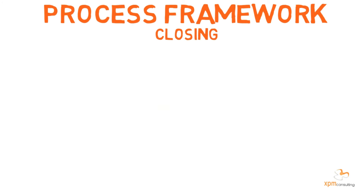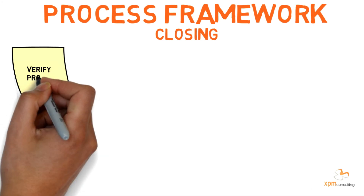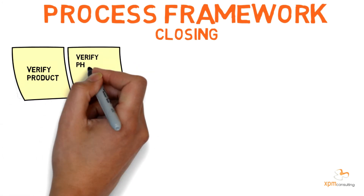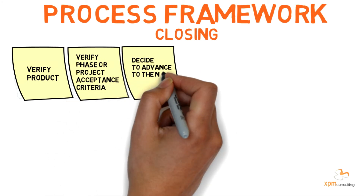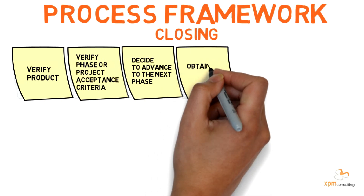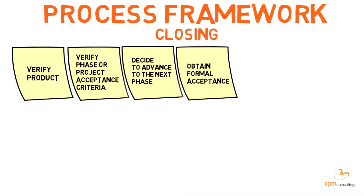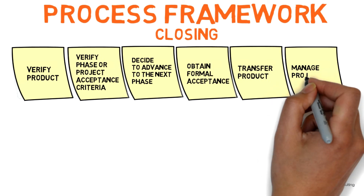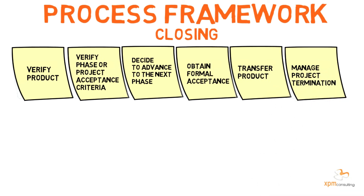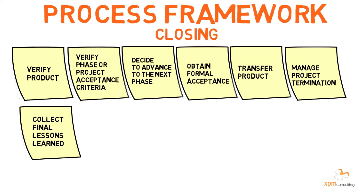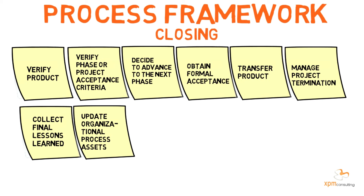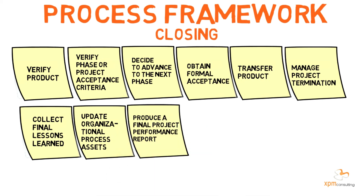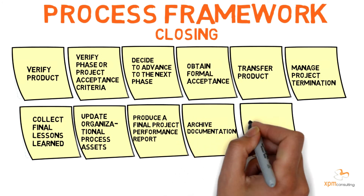While closing, the project management team may: verify if the product was delivered as required; verify if the phase or project acceptance criteria were met; decide whether to advance to the next project phase; obtain formal acceptance to close the project or phase; transfer the product to operations; manage project termination before completion; collect final lessons learned; update organizational process assets with the acquired lessons learned; produce a final project performance report; archive project documentation; and release resources.